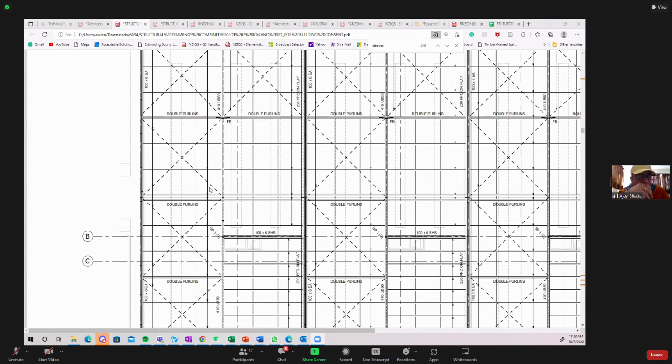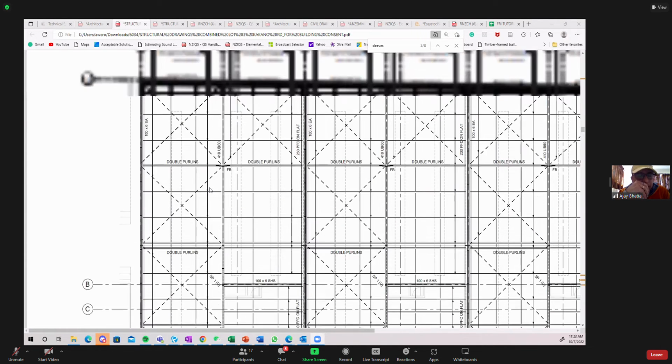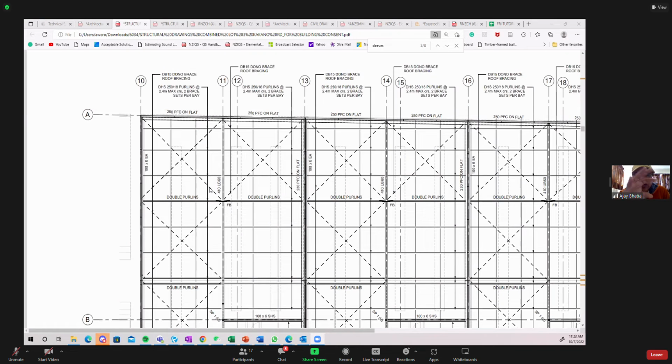Now, again, Angela, the 2.4 center is very detailed information given to you, because what you're looking at is a detailed drawing. You just go by the normal understanding. If there's a steel frame and a steel purlin going, normally the spacing is 1.8. If it is a timber frame and you've got purlins going on timber, then the normal spacing between the purlins is 900.